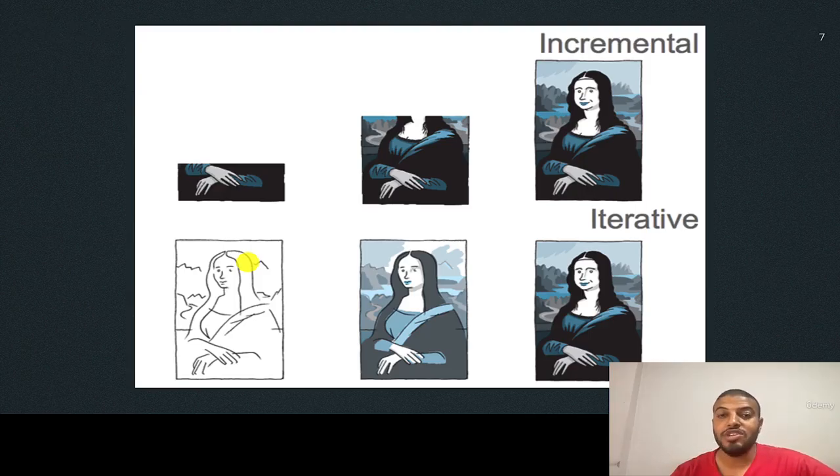So what is better in this situation is to use the incremental model at least at the beginning of the life cycle. Let's take the first room, use it as a prototype, paint it, then add lighting to it, and then add furniture to it. And then get feedback from the client, which is your wife, or the manager if this is a hotel that includes many rooms. If they approve what is done in the first room, this will reduce the cost of finishing the rest of the 999 rooms. So in this case, we will do all of them in an iterative way. This is why I'm saying that it is always better to mix incremental and iterative models at the same time. This is how you apply Agile methodologies in your project.